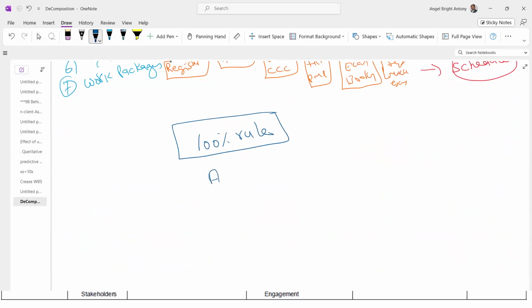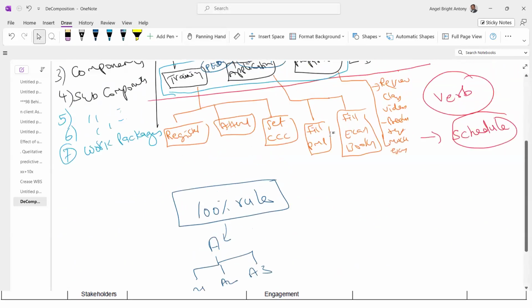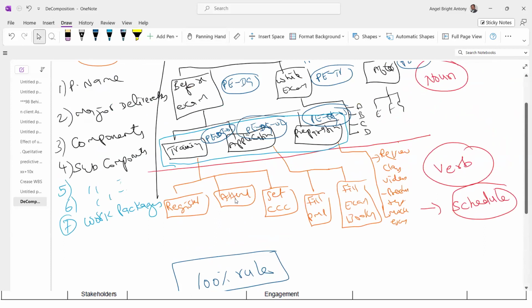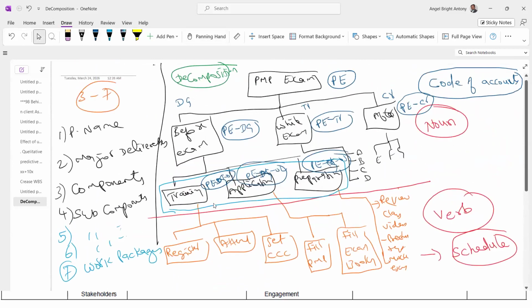If I have a component A and I am decomposing it into A1, A2, A3, when I finish A1, A2, A3, 100% of A is done or complete, right? So I registered for the training. I attended 45 hours of training, got my course completion certificate. The training work package is 100% complete. I filled these two applications. Application is 100% done. Preparation is 100% done. I'm done with training, application, and preparation. Before exam is 100% done. And after it's done, PMP exam requirements is 100% done.